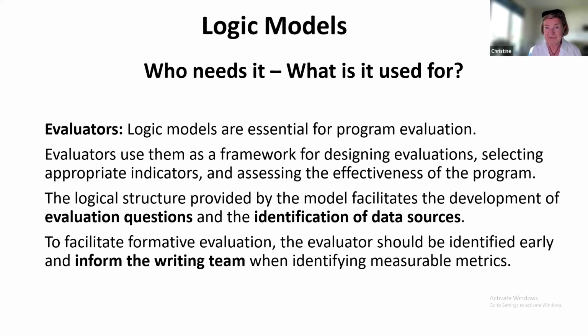To facilitate formative evaluation, that is evaluation that happens throughout, not just at the end of funding periods, but throughout the project, the evaluator should be identified very early in the proposal development process, so they can inform the writing team to help them identify measurable metrics that then later will be used in the formative evaluation process to give you continuous feedback to help you improve the communication between team members, flow of information inside the team and to the outside, all these things that will be part of the evaluation process.